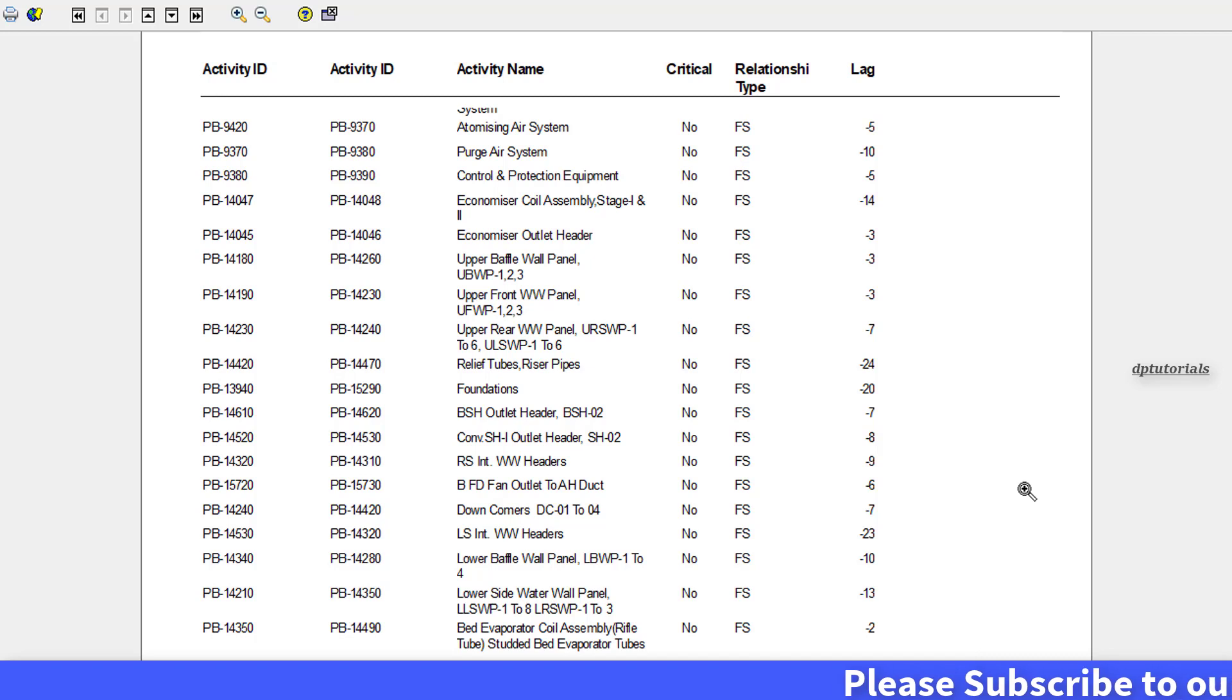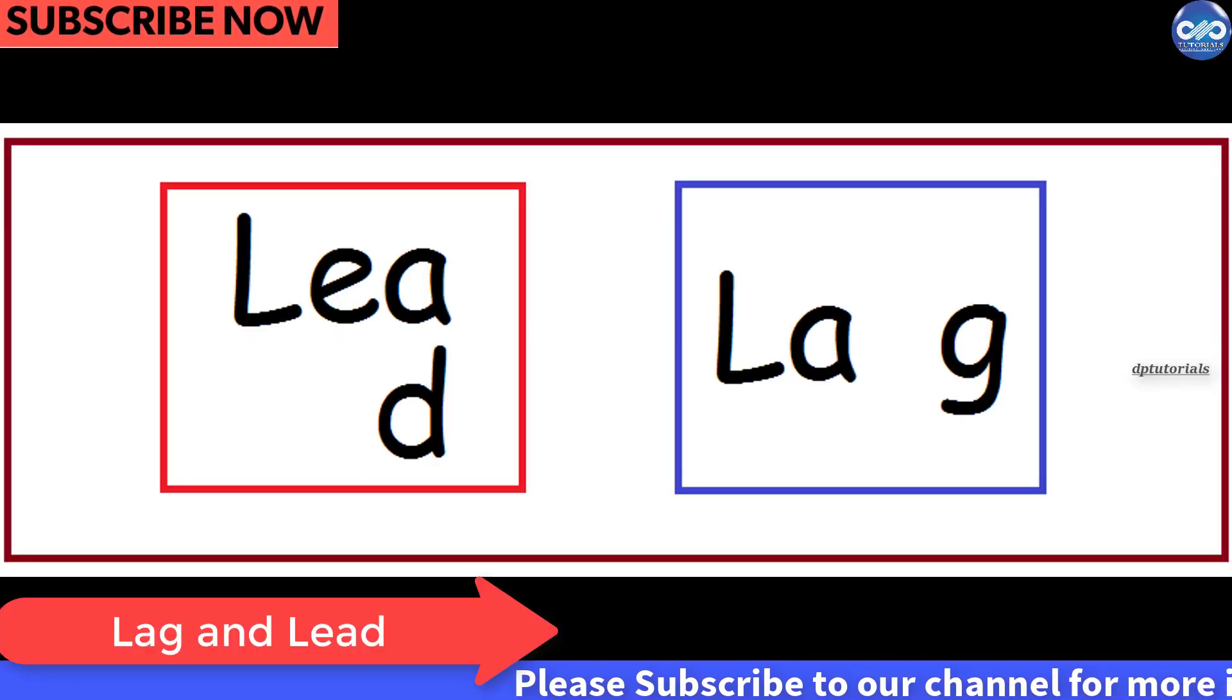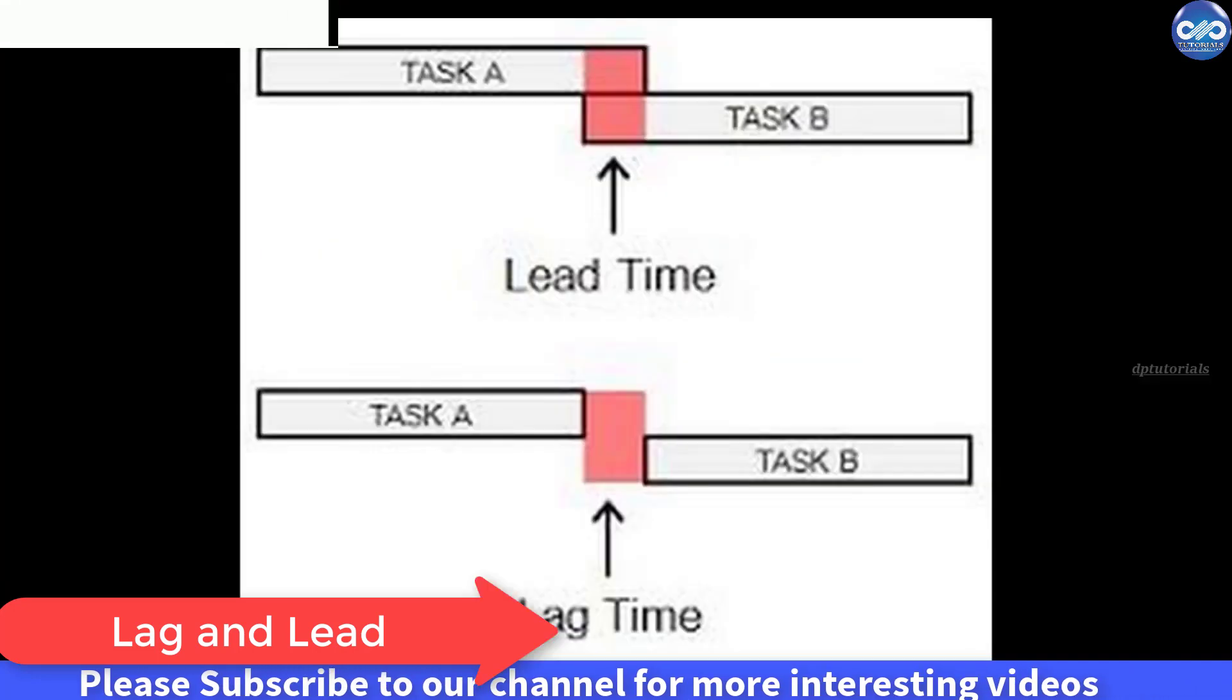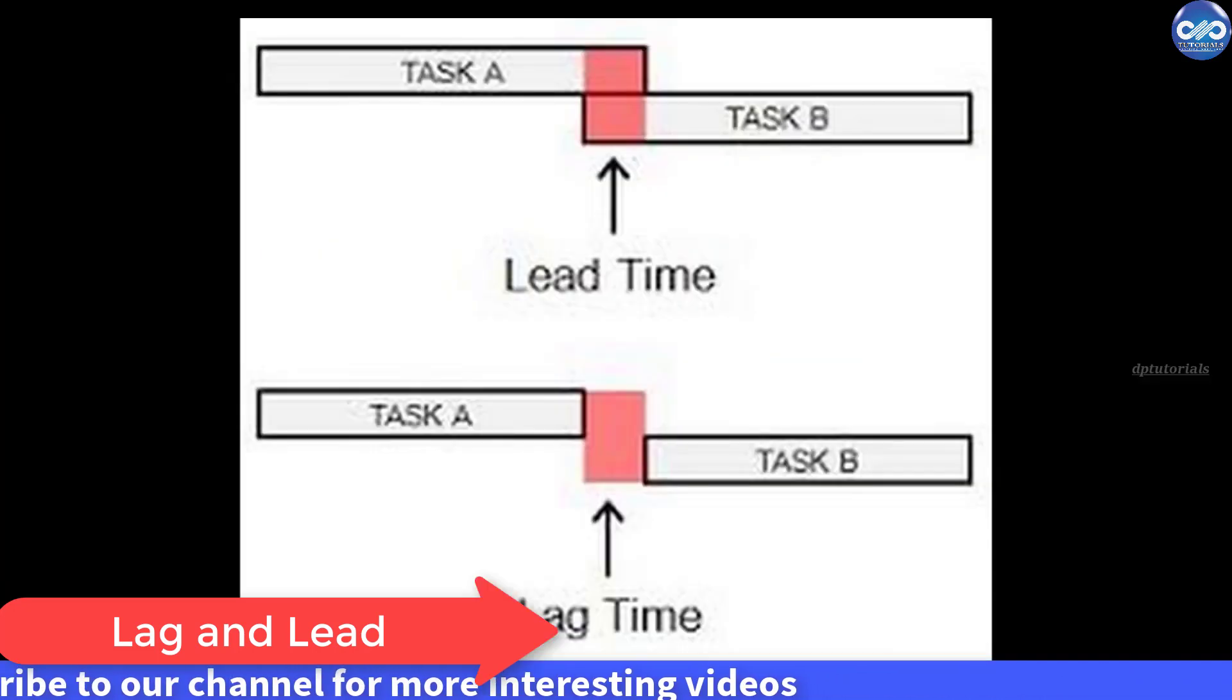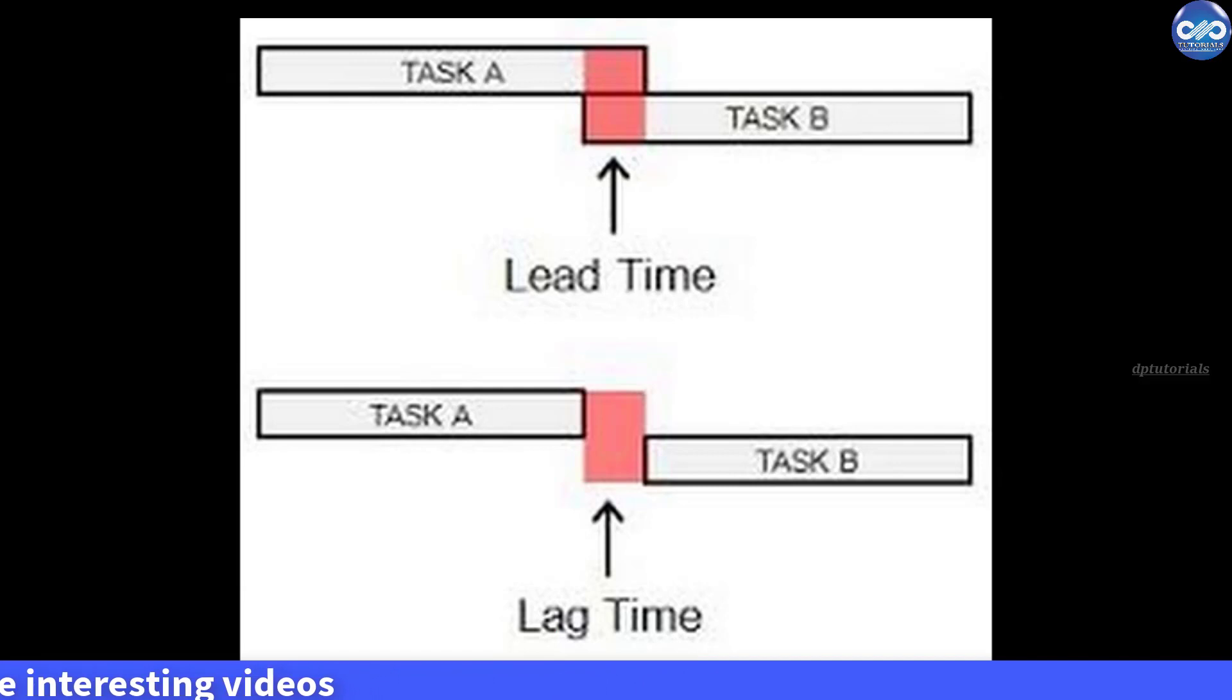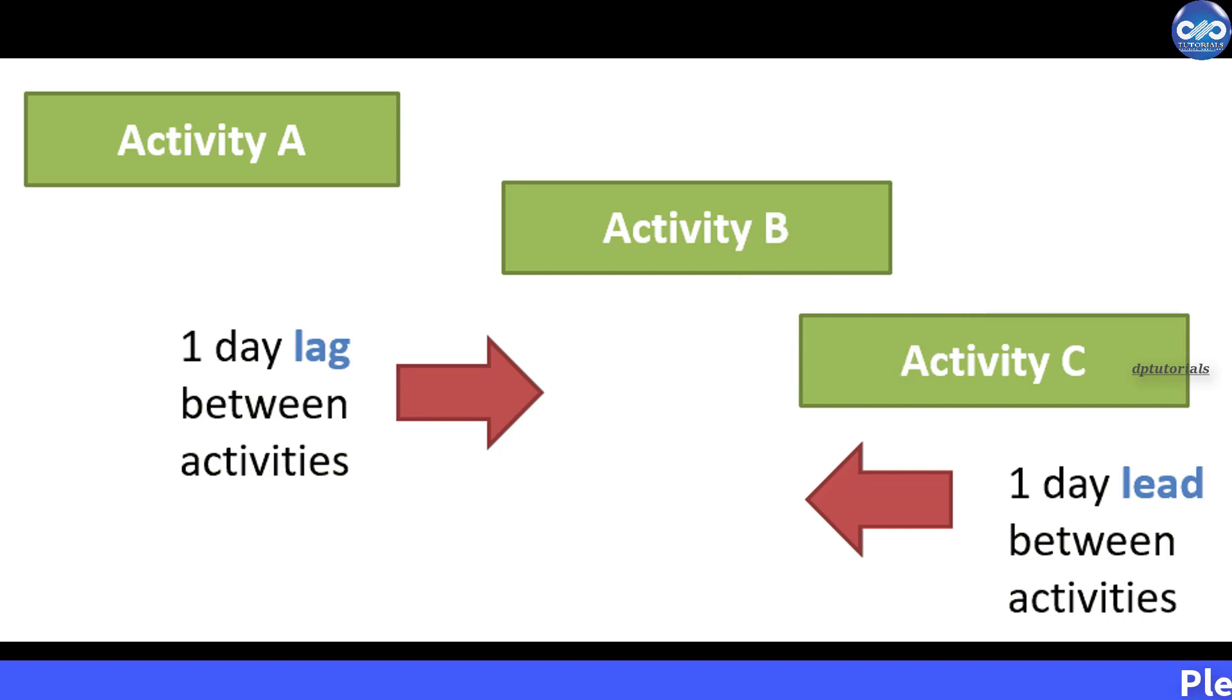First of all, what is lag or lead in Primavera P6? Lag is the duration that is added to any relationship as a waiting time to start the successor activity. If the lag is positive, it will have a wait time and if lag is negative, the successor activity will overlap with predecessor activity.